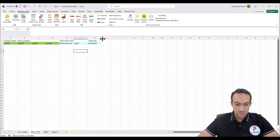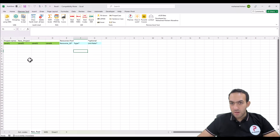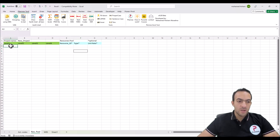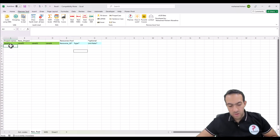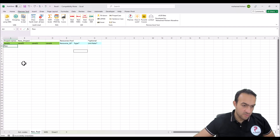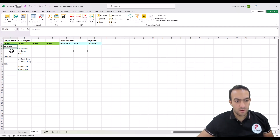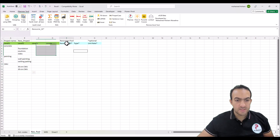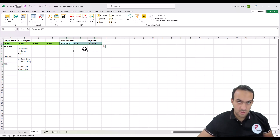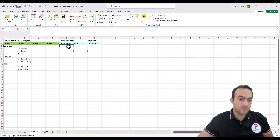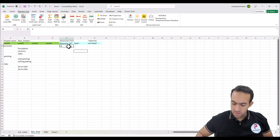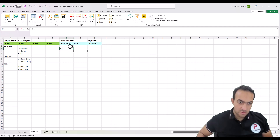Today I will start with the resource pool, or resource dictionary. If you have a BQ and want to load materials into P6, you can adjust the BQ here — for example, 'floor' as our item. These three fields are optional, however if you want to add a resource ID, which I prefer, you can use the BQ number. Here, three-one.